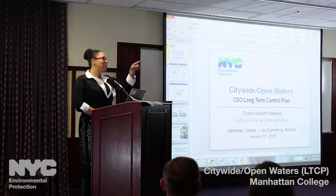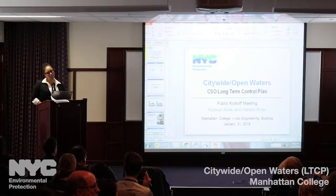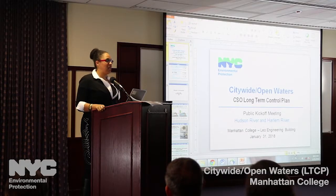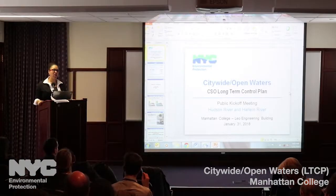Would you be able to put the presentation on the website? Yes, that presentation will be online by tomorrow. Do you have a deadline by which you have to report back to the DEC with the plan? We do. Currently that deadline is December 2018. But for many of you who have been following this process pretty closely, you know that it's a new element that we are going to be sharing the selected alternative with the public before we submit to the state. So at this point, our deadline is still December 2018. But if we run into challenges with that timeline, we may be asking for an extension. We may not. We'll know that along the year.